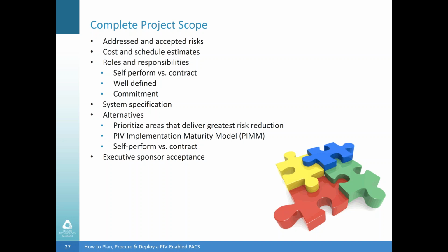The other way to do this is for you to specify the functions that the products must perform and let the contractor make that selection and become responsible that it'll meet those functional requirements.